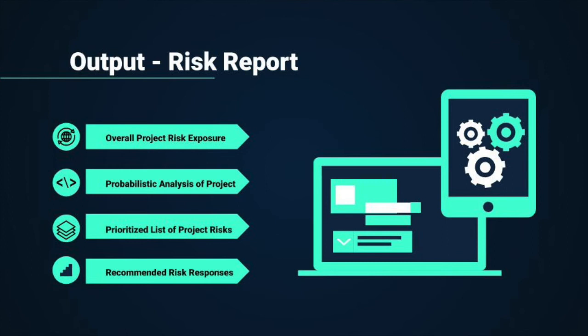So one of the key outputs from these techniques would be a risk report. This should include items such as the overall risk exposure of the project, probabilistic analysis. It should prioritize the risks, and it normally includes recommendations on how to proceed.